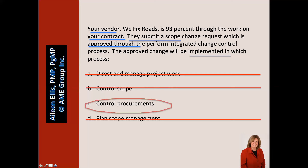Remember, approved change requests are not only an input of Direct and Manage Project Work, but they're also an input of Control Procurements. The question is implying that the approved change request is related to the contract with the vendor, and therefore it gets implemented in Control Procurements. Plan Scope Management doesn't make sense here.